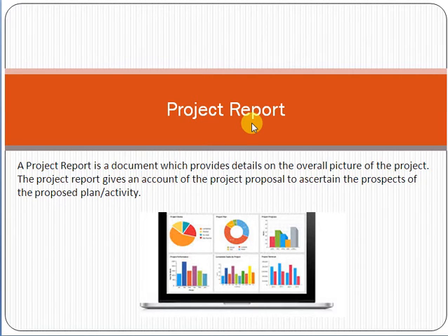Project report. Friend, for example, you are a project manager and you are implementing an e-commerce solution for a customer, and you have to give a project report to your customer and your senior management. So basically friend, consider a project report as a Word document in which you explain the overall status of a project: what you have accomplished, how you are going, which things are completed, which things are pending, what issues you are facing, what risks you are facing, what problems and roadblocks are in your project.